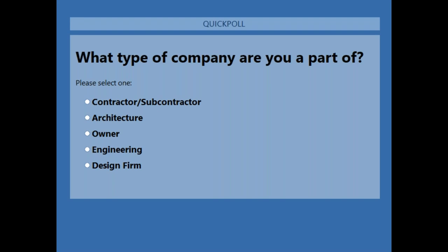So firstly, daily reporting. Let's jump in here, there you go. So our site diaries or our daily logs. From a legal point of view, it's very useful to document what happens on site every day. And again, do this with your mobile. Get your weather automatically, or it can override your manual input, and add some weather notes.